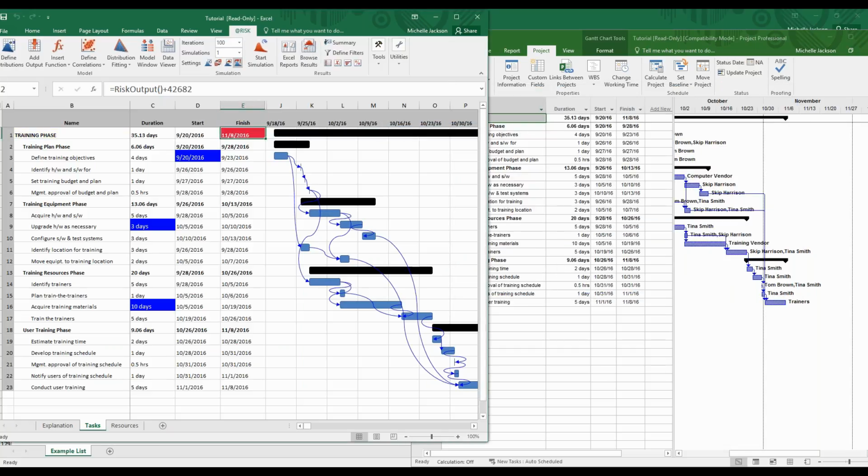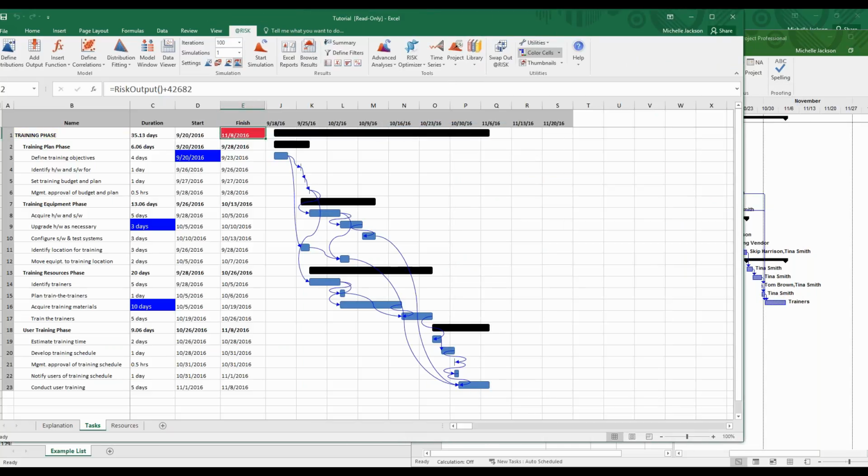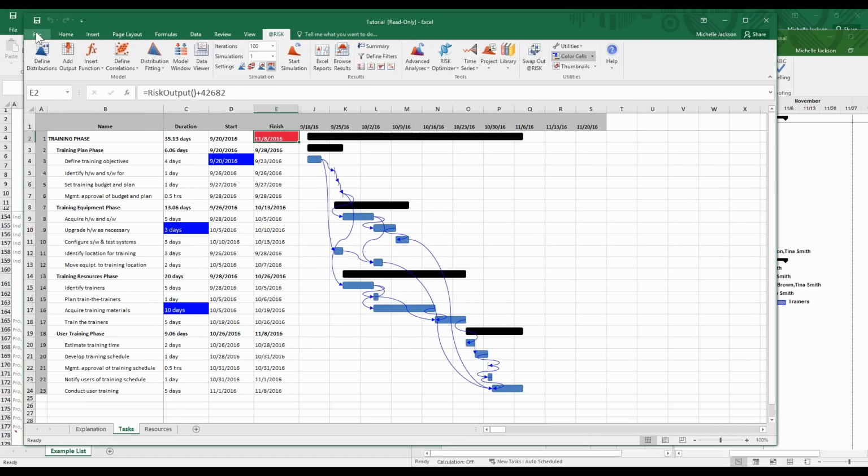There's so much more with project. You can do parameter entry tables, you can do probabilistic branching, probabilistic calendars where it will skip over certain steps based on dates, or the probabilistic branching, meaning sometimes we want to go through the whole plan phase, but sometimes we're going to skip over the testing. So you can actually set different parameters and it will simulate that and emulate that so that you have better information.